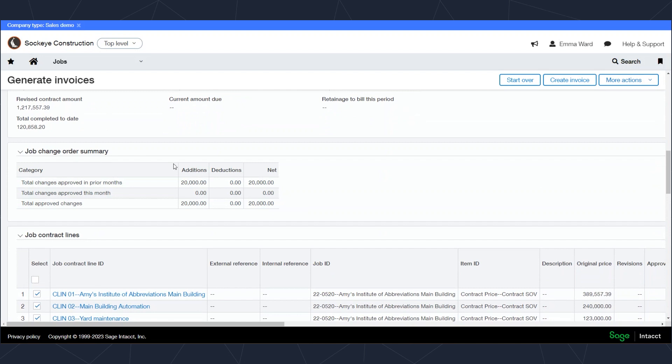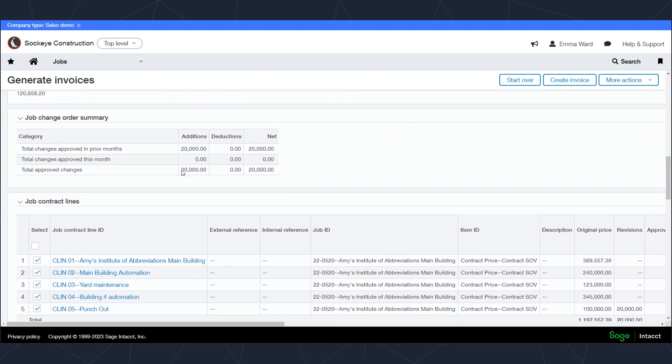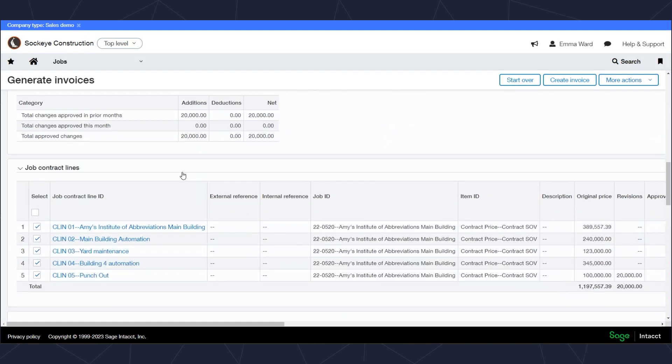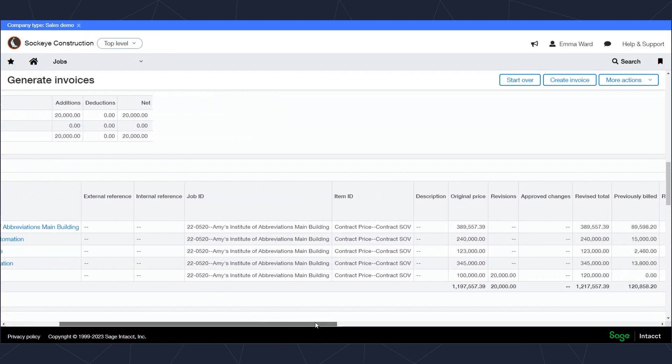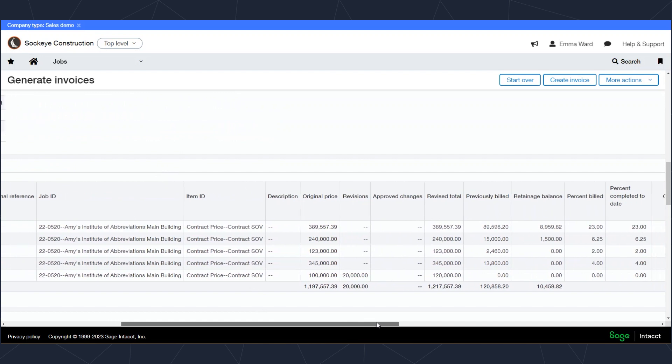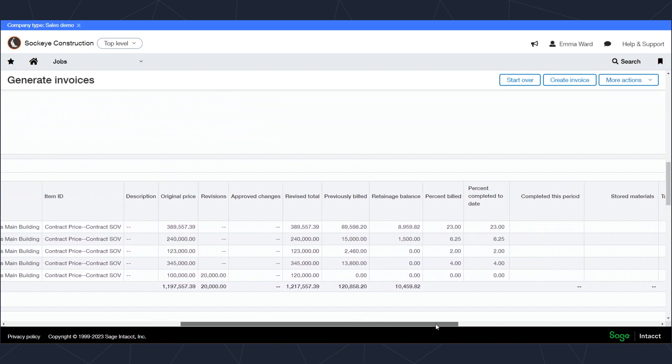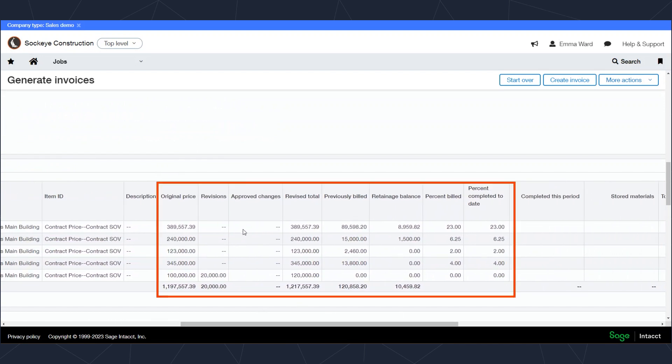But down here on our job contracts line, we can see the heart of the billing process. We see each contract line item there, and as we scroll to the right, we can see the original prices, any revisions as well as any change orders and their revised totals. Furthermore, we can see how much was previously billed, both by dollar amount and by percentage, as well as the amount retained on each of these line items.